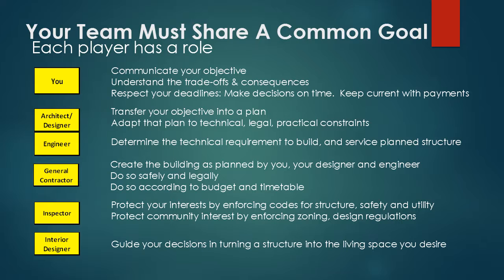Making those choices after the more technical design is locked down, or even after construction is underway, can lead to disappointment when good ideas can't be incorporated into the structure that's being built. Alternatively, that timing can add significantly to costs and timelines as building structure is reworked to adapt to interior design decisions.